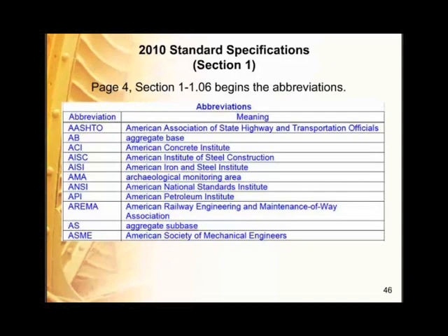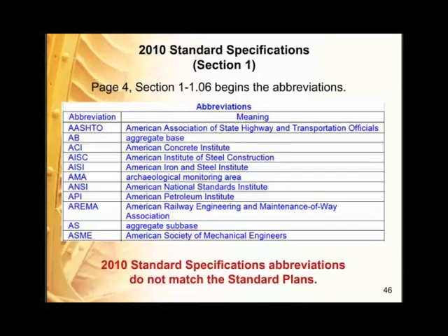On page 4 of section 1-106, we show all the abbreviations. And just as a note, the 2010 standard specification abbreviations do not match up with the standard plan. So if you're using a standard plan, you have to check the standard plan abbreviations at the beginning of the standard plan book.